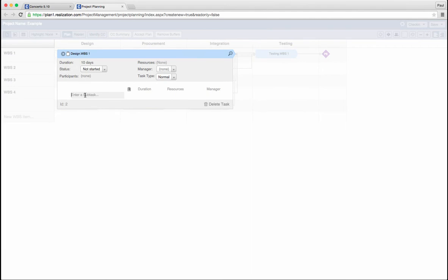When we expand the task for more detail, the use of subtasks can detail the required work scope. By combining task and subtask modeling, you can quickly build a plan, assign high-level task durations, and get a quick estimate of the project cycle time. Adding subtask detail, which would come later, does not alter the overall structure of the project framework.